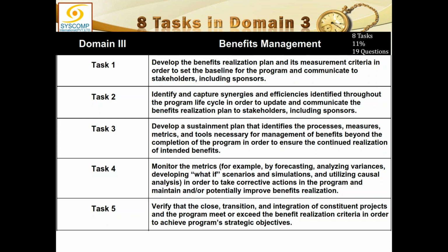So here there is nothing like gold plating. If we exceed the benefit realization, that is positive. But if we do not achieve all the benefits, we do not realize all the benefits, then probably we have done something wrong. So benefit management will only be considered complete if all the benefits destined from this program have been achieved, have been realized.